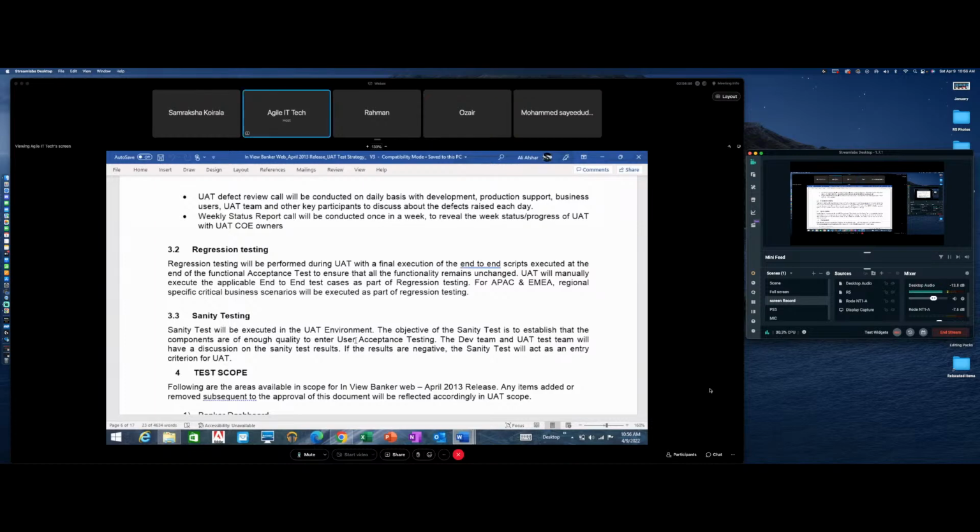So if you're doing about 40 to 50 in a day, in a week it would be about what? Remember, when you run into a defect, you stop testing and you have to log that defect. You understand? And you have to go and rerun that test case one more time to make sure it is still failing. You understand? So if you were testing about 40 to 50 a day, in a week you would test about how much? 200 to 250, correct?